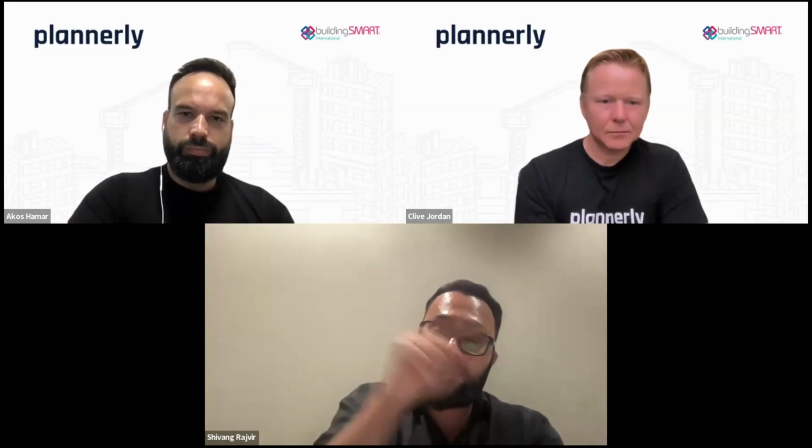Otherwise, all the consultants, all the appointees will have to come to the guy who is managing the information, and they will have to constantly ask him. And if in the local context, Indian context, that's a third party or a consultant, there'll be a lot of back and forth, because again, all the consultants or appointees working on a project will report to this information manager, and that information manager will take approval from the owner. So there'll be a lot of back and forth. So even the owner's BIM manager or project manager should be part of this BIM execution plan. That is my local experience.